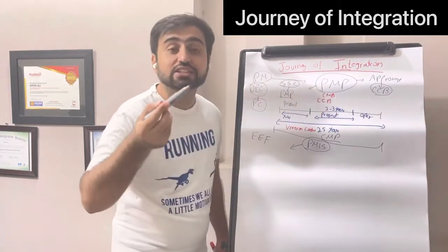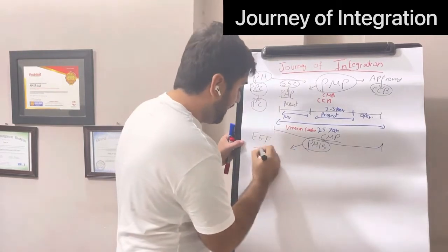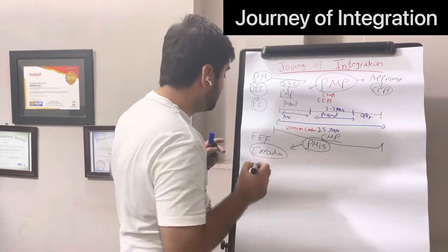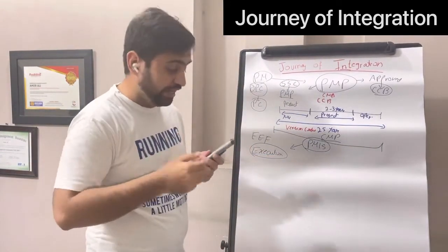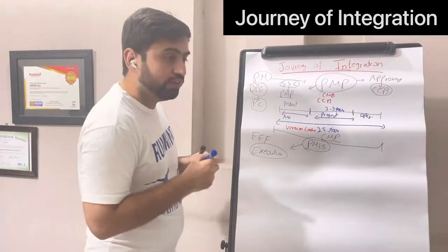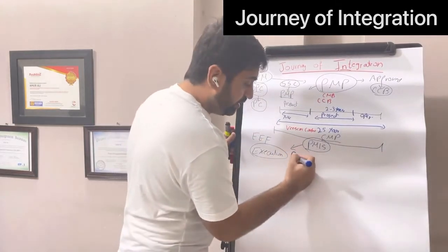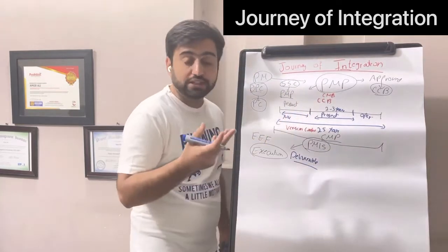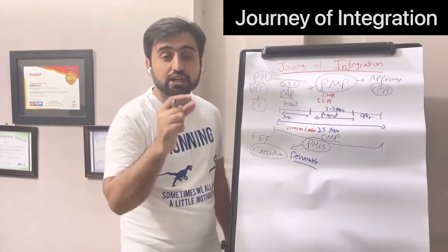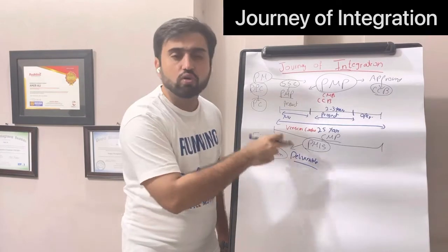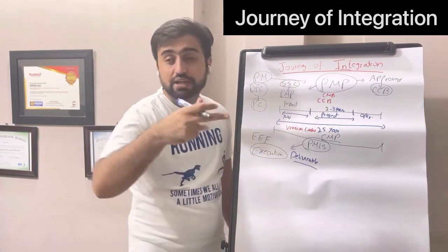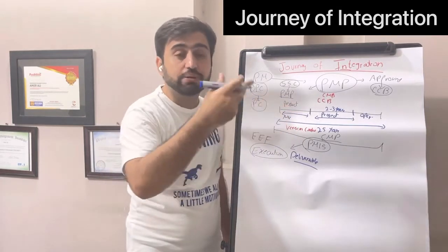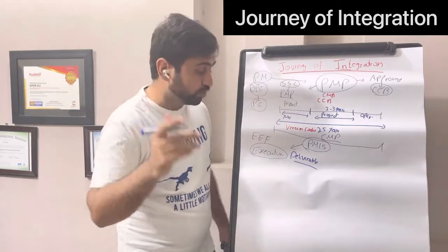Once the plan is approved, you start doing execution. Real work starts happening in execution, and in execution we will get deliverables. Deliverables will be produced, a tangible thing for which we have undertaken the project. A deliverable can be the entire project or a part of the project. And we know what happens in the journey of a deliverable. It goes to quality and becomes a verified deliverable. It goes to validate scope and becomes an accepted deliverable. Then it goes to closing.